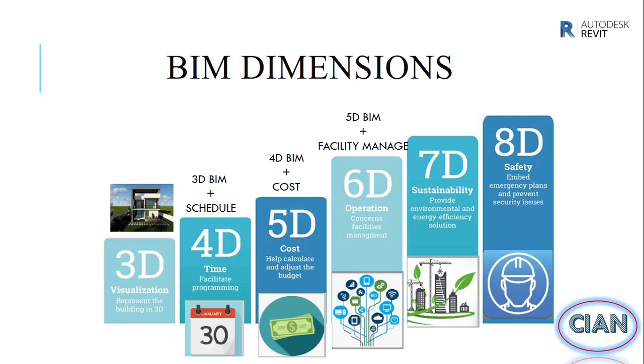This BIM dimension is also known as I-BIM or integrated BIM. 6D BIM involves the addition of other relevant information that supports the facility management and operation in the hopes that it will bring about a better business outcome. The 6D process means that a model that was created by a designer gets updated or modified in the course of the construction. This particular model can be submitted to the owner as an as-built model. The model will comprise the necessary information that will be needed in case of any future maintenance. The information includes things such as warranty information, manual information, operation and maintenance information, etc.